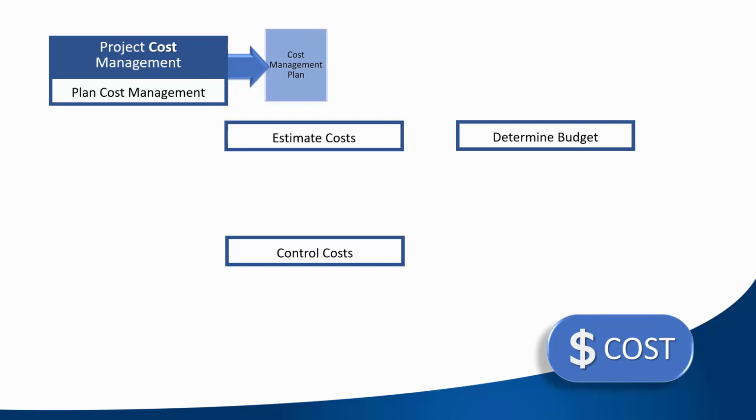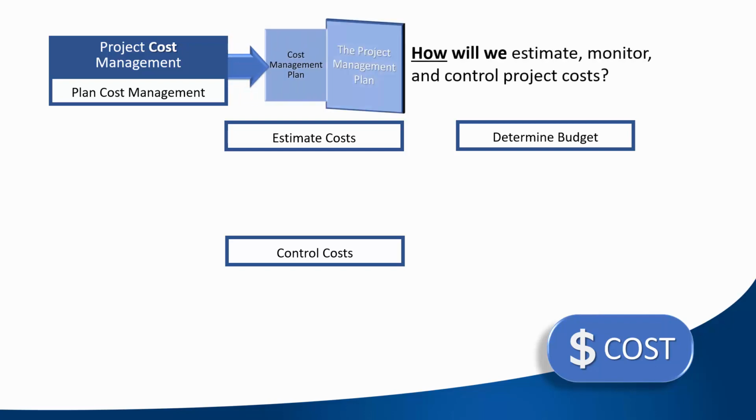Plan cost management produces the cost management plan, which we recognize as a component of the project management plan. That provides guidance to the other processes. Estimate costs is the detailed work of estimating every cost, whether materials, labor, equipment, or outside services. Do you remember the basis of estimates? We saw this in the project schedule management lessons. The basis of estimates describe the underlying facts and assumptions that were used to create each estimate.